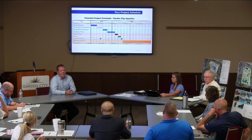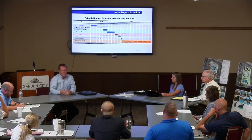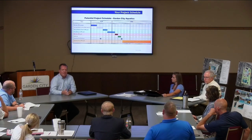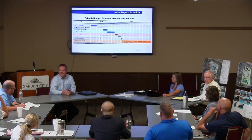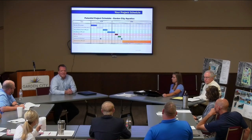And sometimes the way to manage that is, a lot of times in communities, the attendance and the interest drops off pretty quickly. It's late in July and early August, so you can manage that a little bit by, say, closing it a little bit early one summer, getting past your real peak times, and then closing it a little bit early in order to start the construction process. So you can do things like that to give more time than just the standard, say, 9 months off season.